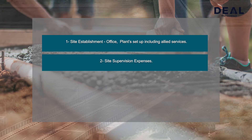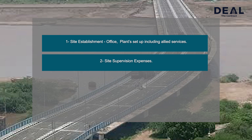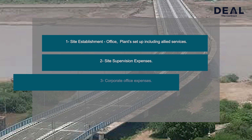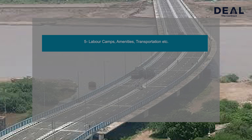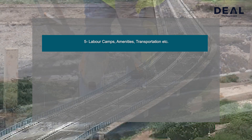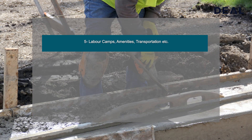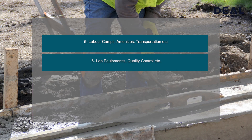2. Site supervision expenses. 3. Corporate office expenses. 4. Mobilization and demobilization of resources. 5. Labor camps, amenities, transportation, etc. 6. Lab equipment, quality control, etc.